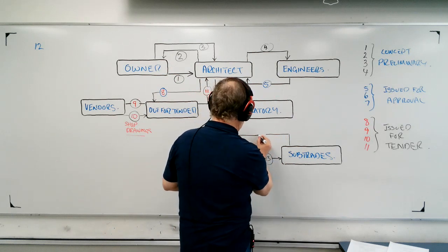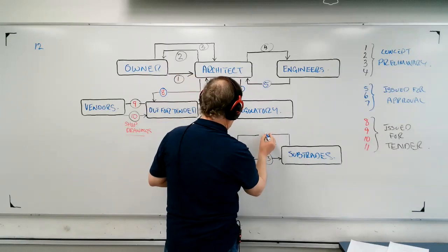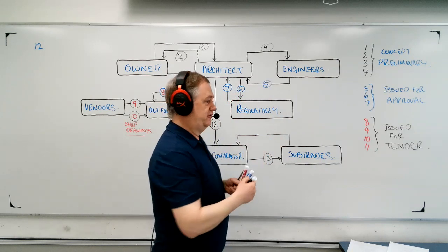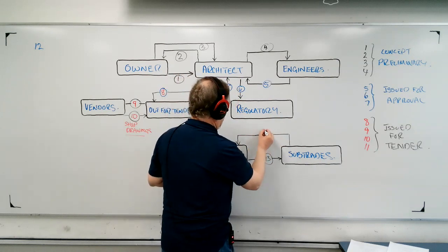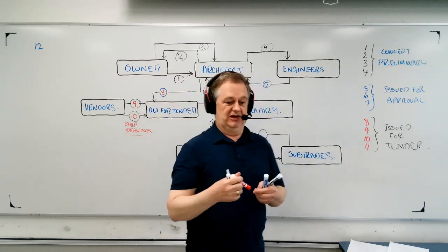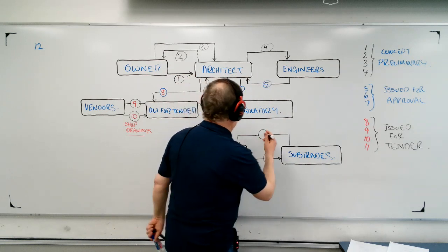And it's his responsibility, normally stated in the specs, within a certain period of time after the job finishes, to deliver the as-built to the architect. And everything has to be recorded. It usually has to be done in AutoCAD and completely professionally done, and all listed down. So this will be step number 14.